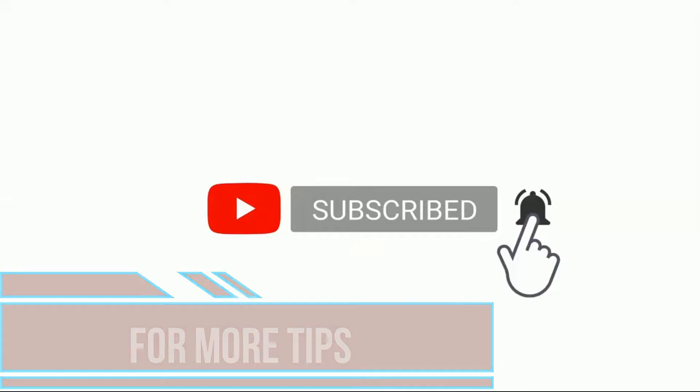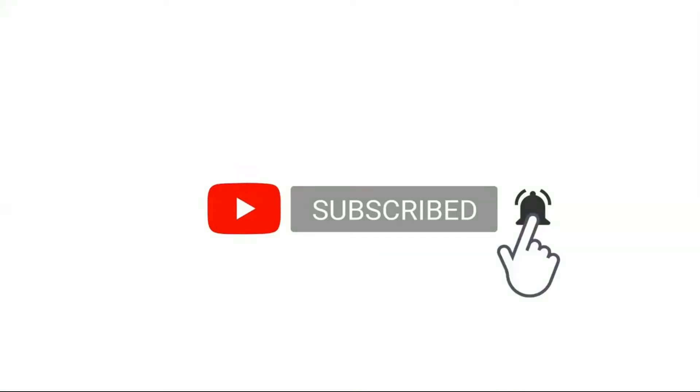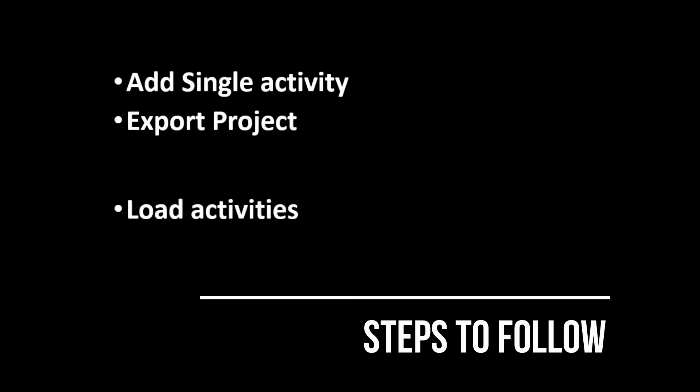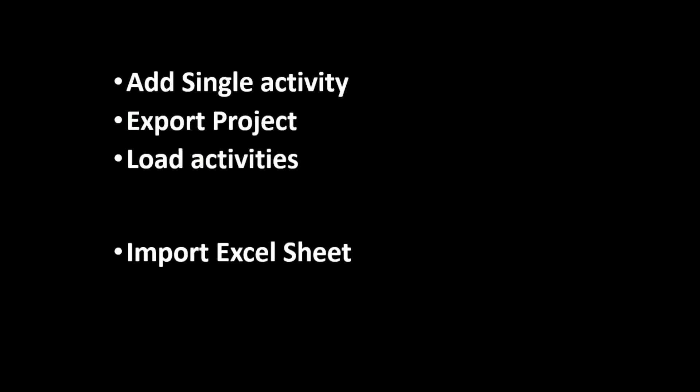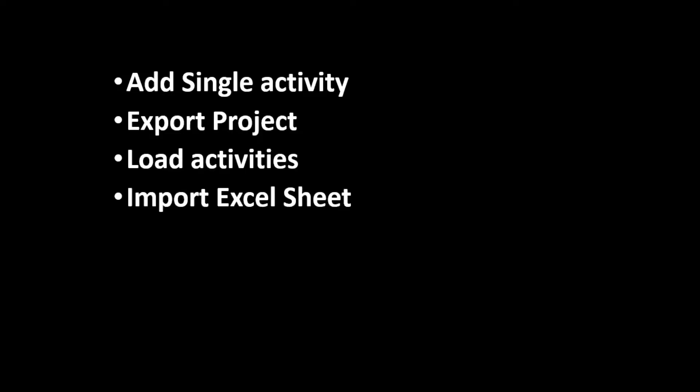This methodology can be executed in certain steps: first you have to add a single activity in your newly generated project in Primavera 6, then export that project in Excel format, then load activities into that Excel format, and finally import that Excel sheet back to Primavera 6.